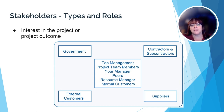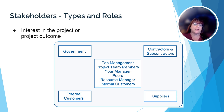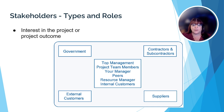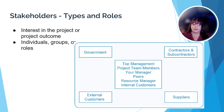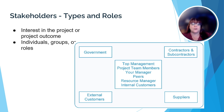Finally, let's talk about the stakeholders. Who are they and what do they do? We need to identify the stakeholders as part of the project charter, so we are looking to include anyone who might have an interest in the outcome of the project. These could be management of the organization, internal users of the project deliverables, external users of the project deliverables, contractors, vendors, or suppliers of the materials that will be used by the project.